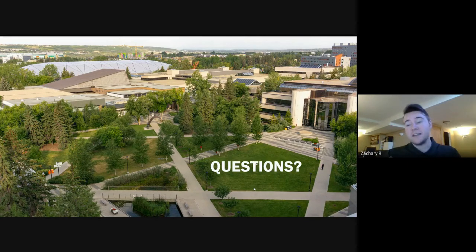And then from there, like Saad was talking about, we split up into smaller groups in order to tackle certain sections, which was both a good thing and kind of a bad thing, because it meant that only certain groups were overly familiar with certain sections. But I feel like overall in the end it was definitely the right choice for us to split off like we did, because it allowed us to tackle a lot more issues at once and really get the project completed at a faster rate than we would have if we'd all tried to work on the same thing.